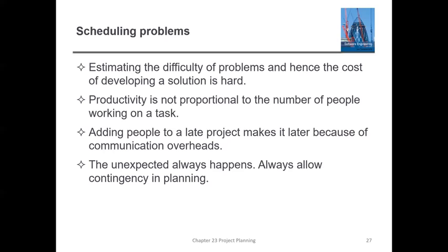So definitely, to get good productivity, you should have enough people working on the specified task. And also you may need to add people, because suppose your project is already late and you can't finish within the time period, then you have to increase your resource persons.